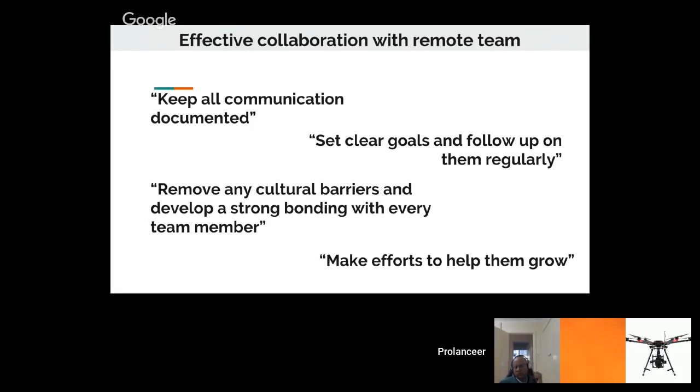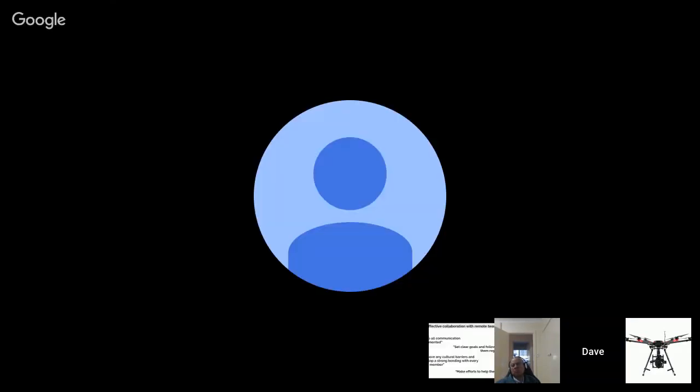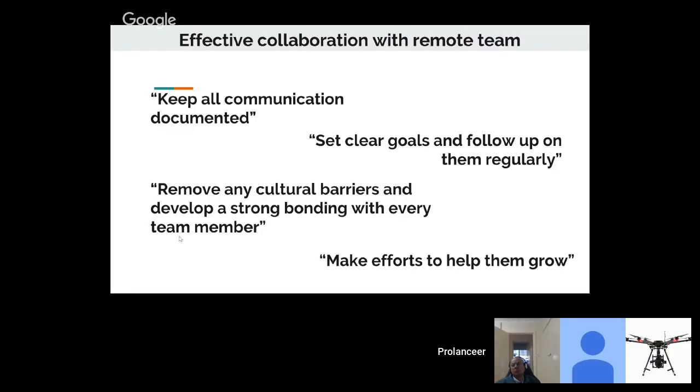So they will just update, like I'm working on ABCD features and what issues they are facing, and what they accomplished on the previous day. So exactly, you'll be on the same page every day. Yes. So in the Scrum meeting, there is a process called daily stand up, where every person would communicate what got done the day before and what they're going to do today. So try to have that daily stand up with the help of Slack. There are a few bots available which will make this work easier for you.